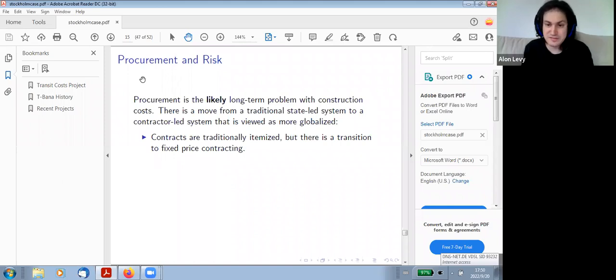You can specify quantities and then, or I think it's called fixed price with adjustable quantities, which is you say what the number is, but then you itemize parts of it. And then if there are such changes, again, you don't need to litigate what's happening. You can point out in the contract. This makes things a lot more robust.